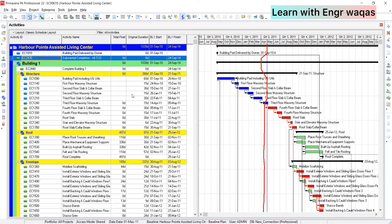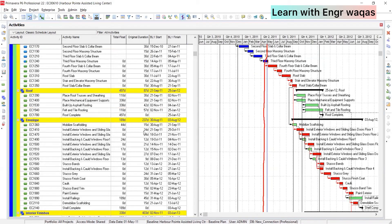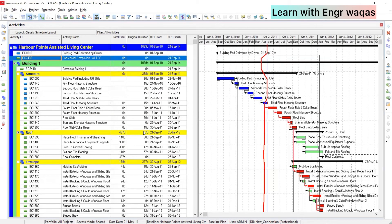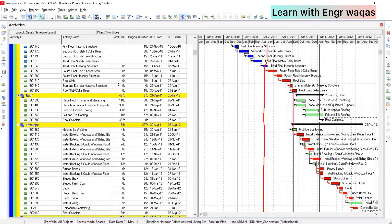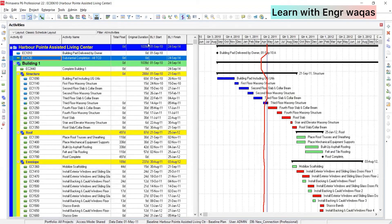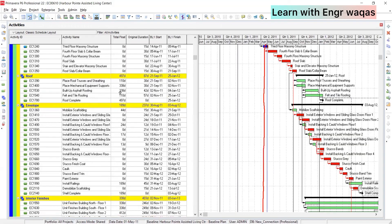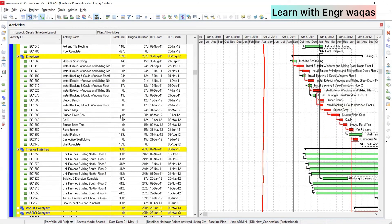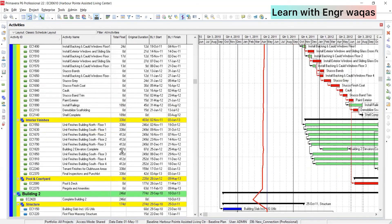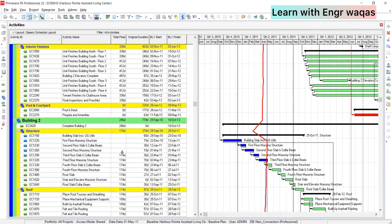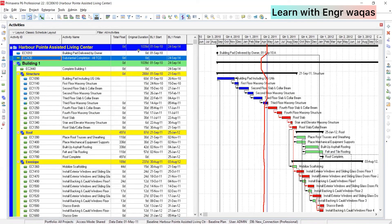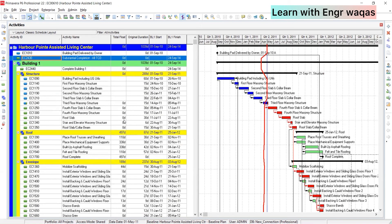So here you can see, the other important question will be asked: what is the criteria to evaluate your project schedule quality? The most important thing - your project float should be not greater than 20% of your project total duration. The total duration is 1039, but now I can see that there is total float but this 338 days, this is maximum I can see right now. So it should not like 412 is more than that. So it should not exceed than 20% of this one. So you can see that 20% of this one is how much, maybe 200 something, but these are more than that. So how to reduce your float? Maybe it's because of your illogical relationships, because of open-ended activities, there can be multiple things.